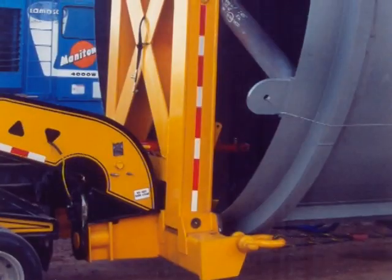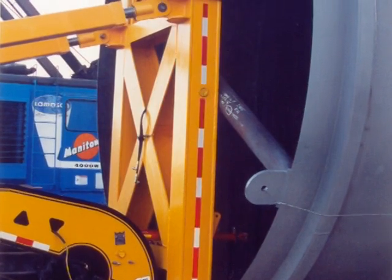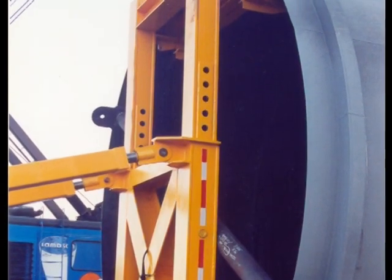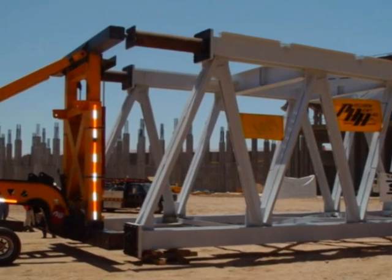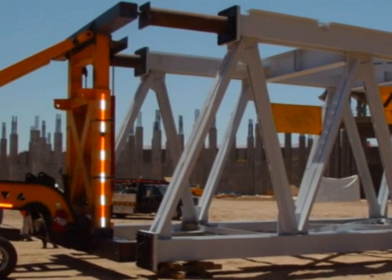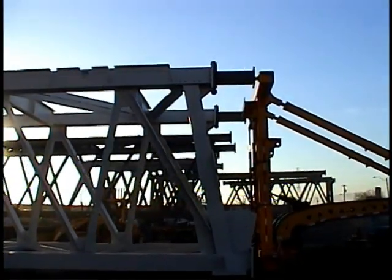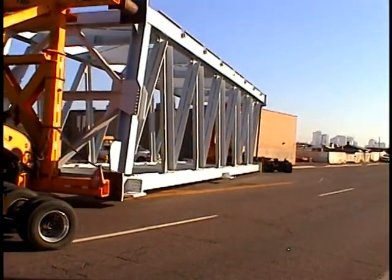Precision Heavy Haul had previously designed and constructed a Schnabel trailer for hauling large diameter pipe. The equipment would require substantial modification, but had adequate capacity and the necessary adjustment features. The problem was further complicated by the fact that the ends of the box top chord sections did not terminate the top and bottom beams at the same location. The difference varied by more than 3 feet, and each of the 28 sections required a pair of extensions on the top chord at one end and a different pair for the bottom chord at the other end.